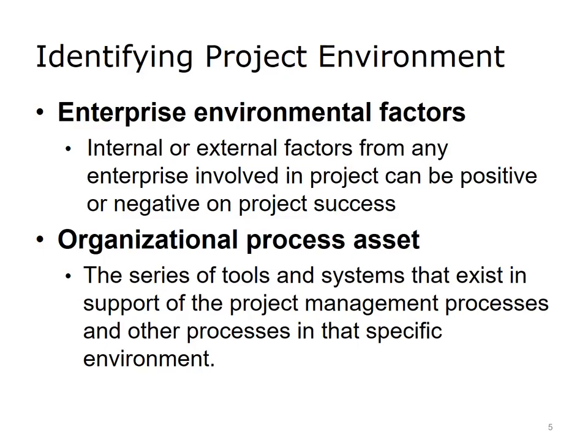During the project selection process, one of the top priorities is to develop a clear understanding of the project environment. When evaluating an enterprise and its environmental factors, the following key factors should be considered: organizational culture and cultural perspective of all involved parties; existence or lack of a project management information system; workflow and processes, including established step-by-step enforceable protocols for organizing and managing a project; and the human resource pool — whether the organization has staff with the skills and knowledge to undertake the project.